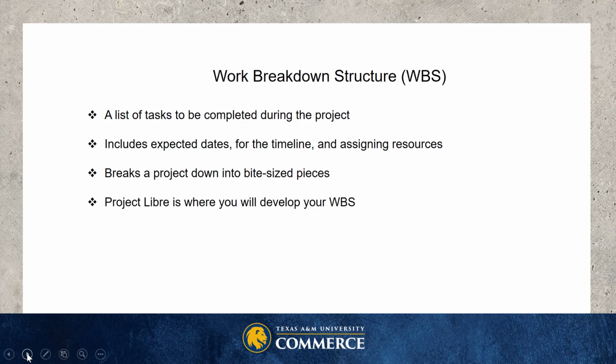For example, you can't start coding a software project until it has been designed. So that would be a dependency. The predecessor is the design of the software, and that has to come before the development of the software. And the Project Libre tutorial that's in D2L below this is really good. It will show you how to do that. It's quite simple, so don't get bogged down in the software.